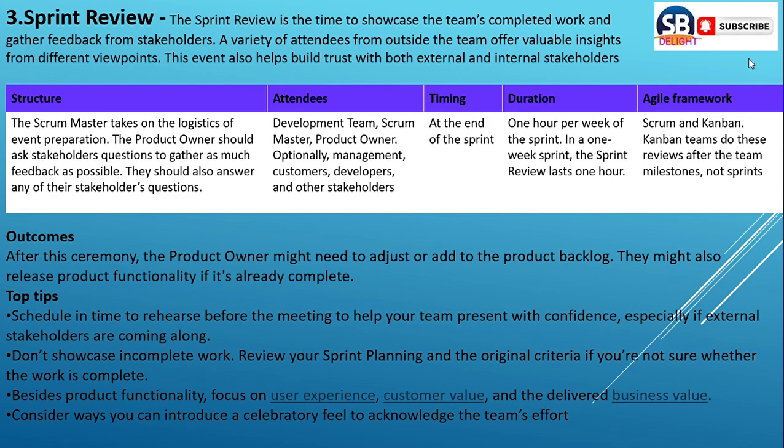Top tips means schedule time to rehearse before the meeting to help your team present with confidence, especially if external stakeholders are coming along. Do not showcase incomplete work. Review your sprint planning and the original criteria if you are not sure whether the work is completed. Besides product functionality, consider user experience, customer value, and the delivered business value. Consider where you can introduce a celebratory feel to acknowledge the team's effort.